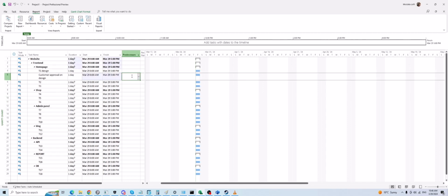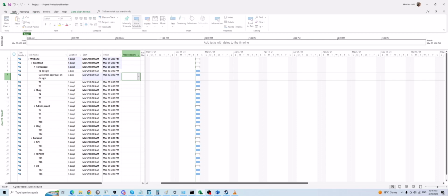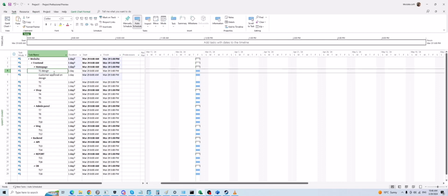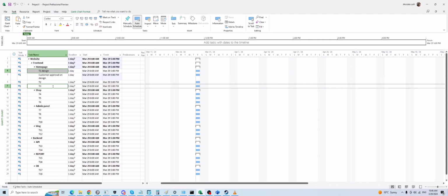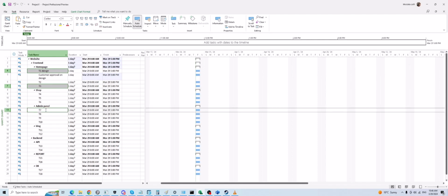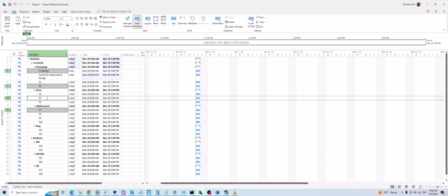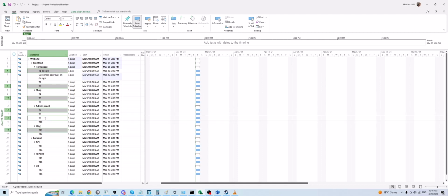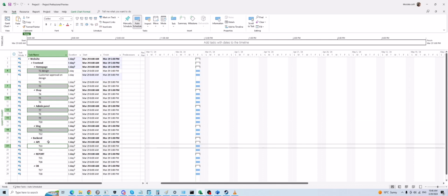Another way to create a link between tasks. So far we discussed two ways. Let's say I press Control and left click on a task, then left click, and left click again on several more tasks. Remember, an important point here is that when I'm doing this, the sequence of selecting tasks is important.